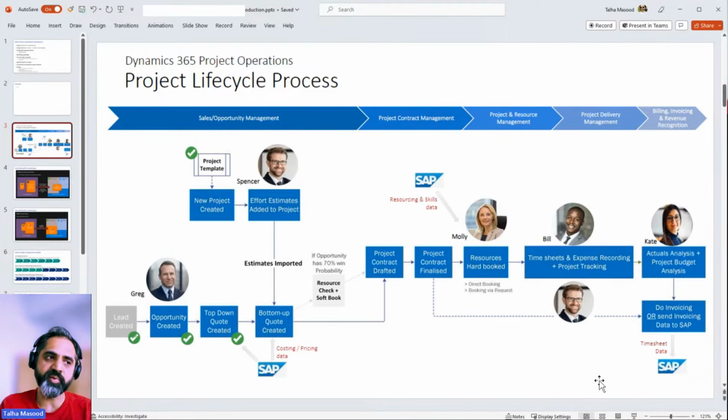So let's say a particular task had 20 hours of budget, or you can say 4 days of budget, right? Now my timesheet data is telling me that a resource which I assigned to this particular task has consumed 2 days out of the 4 days. So that is giving me traceability that out of 4 days of budget, 2 days are already used, 2 days are remaining. So that gives him an opportunity to think about, okay, I've spent half of the time, but have I achieved half of the value as well or not?